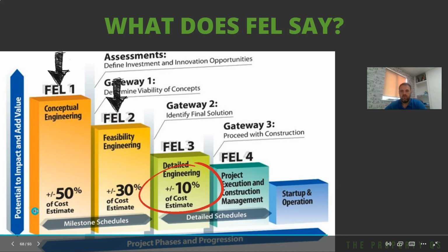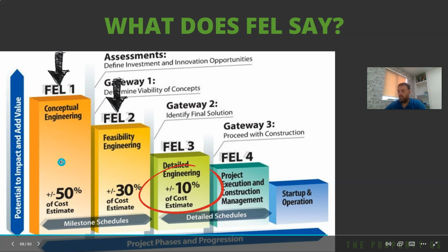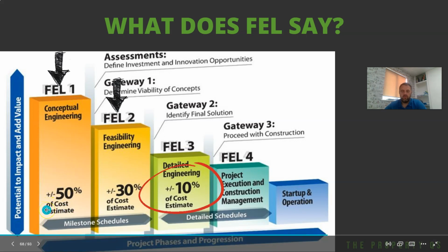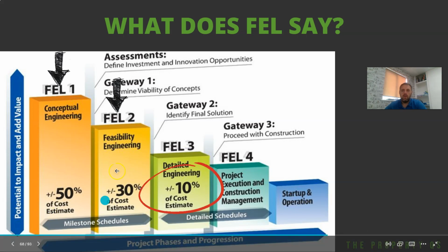I know people have told you before that ballpark estimates aren't the right thing to do, and that rough estimates give you rough results, but that's a load of nonsense. The only reason people say that is because they don't actually understand estimating. The next step in the estimating dance would be to get a plus or minus 30% cost estimate, like an intermediate estimate.